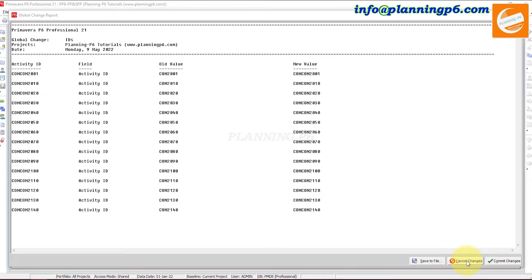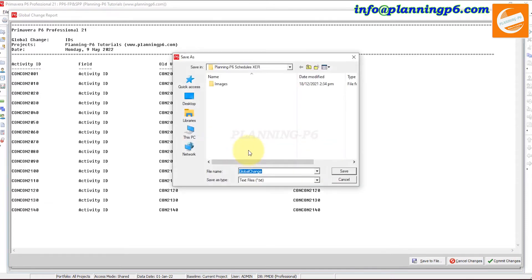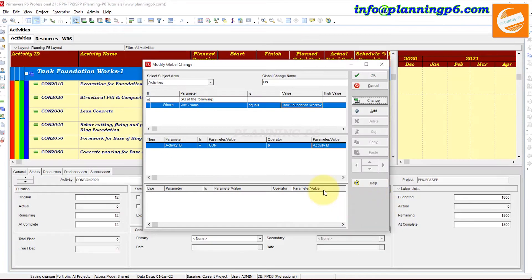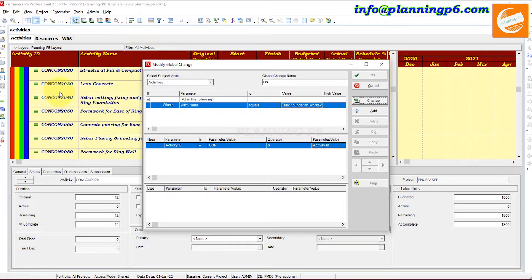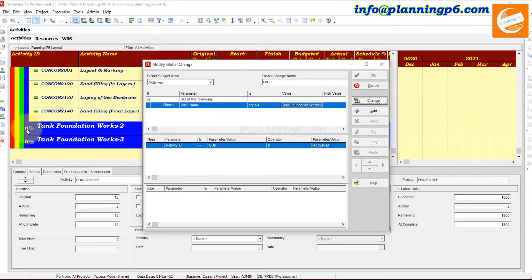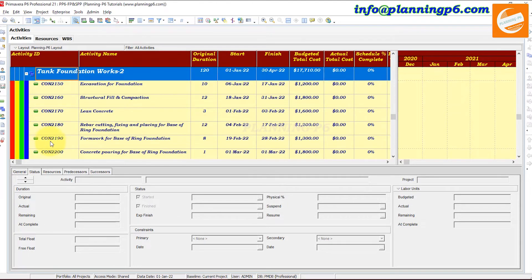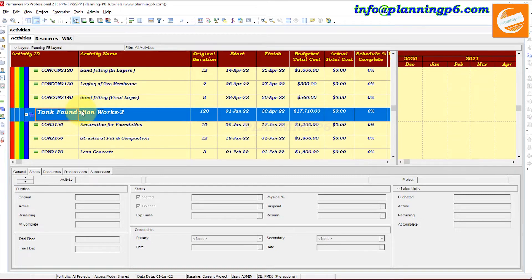You can choose to save the log file — click Yes and give the location, or cancel. After committing changes, you can see the values are changed. The activity IDs now show the new values. After changing, save and close. You can see the IDs have been updated for that one WBS.